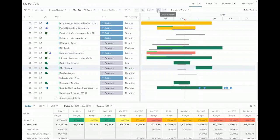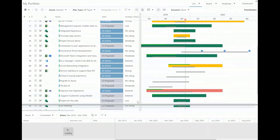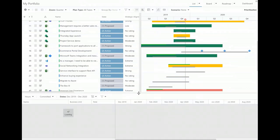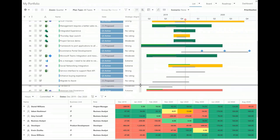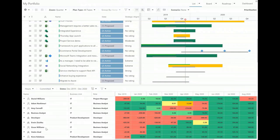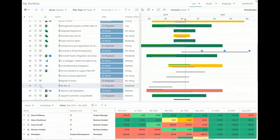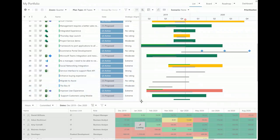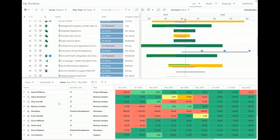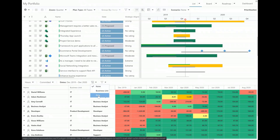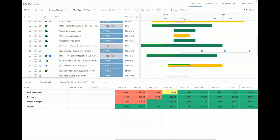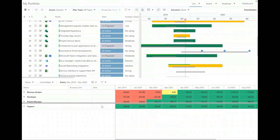At the same time, I can also look at this from a resource perspective — maybe my main constraint isn't budget, or I want to make sure I'm within both budget and resource constraints. I can do all the same types of things here while looking at my resource constraints — seeing all my resources and where there are reds indicating over-allocations. I can check and uncheck boxes and drag and drop to move things around. Right now I'm looking at a very detailed view with each individual resource, but you could group this up by business unit or by role to see higher-level constraints. For example, I'm going to have issues with my business analyst in December, January, and February in my current plan.